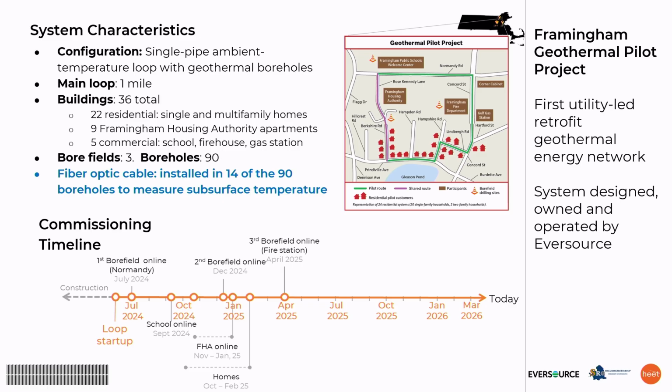So the commissioning timeline. We started recording data in July of 2024, and the commissioning of this project is multiple months. So it's connecting all those buildings and connecting the different bore fields. So the data will show that part as well. So the commissioning goes from July until April of 2025.